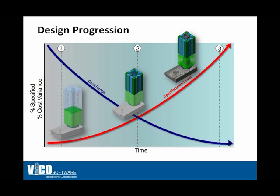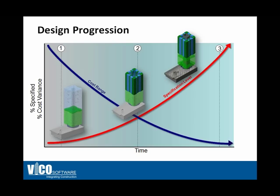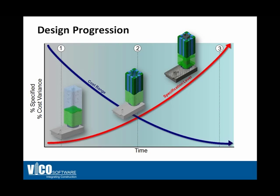Traditionally, going through these design stages, the specification level is increased by releasing design sets — starting with the concept, then going to schematic design, then design development, and then the construction documentation set. The problem with this methodology is that because it's paper-based, you cannot do that too often. The frequency of releasing a new design set is limited, and cost effectiveness must be considered, so there are only so many design iterations you can go through with a paper-based approach.